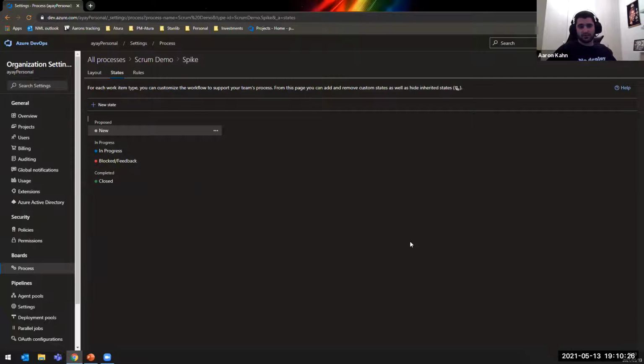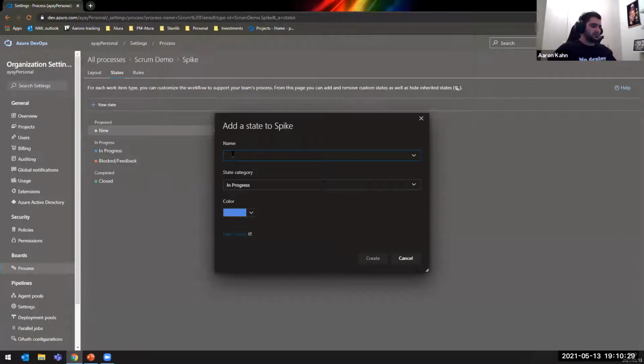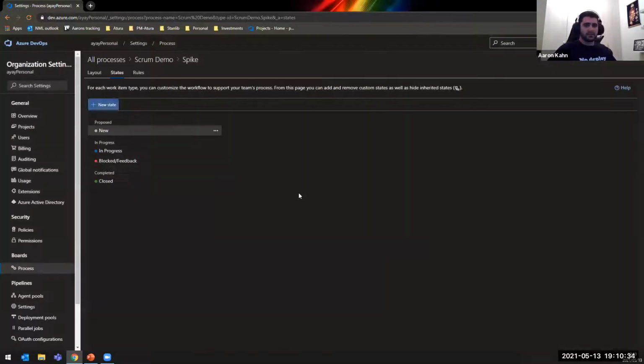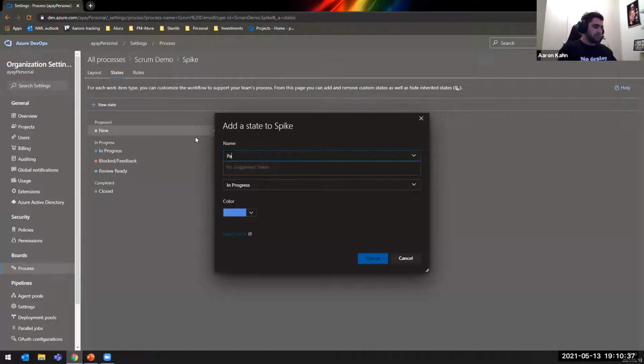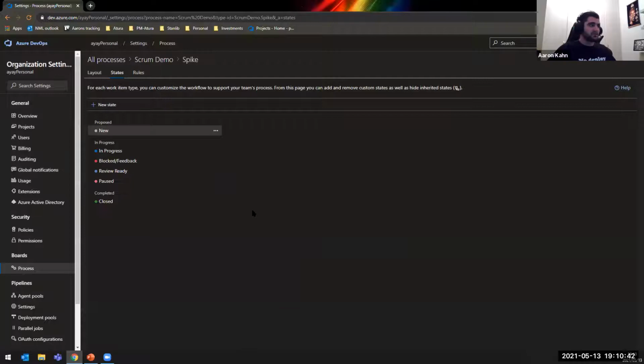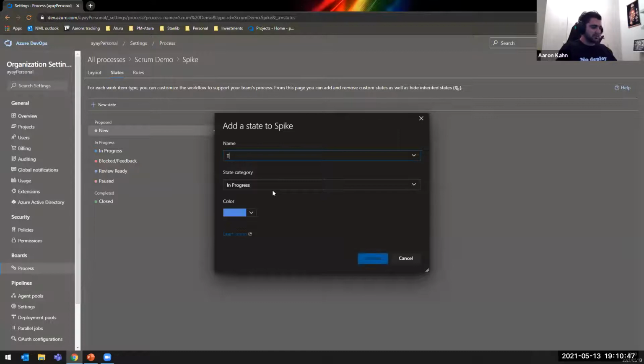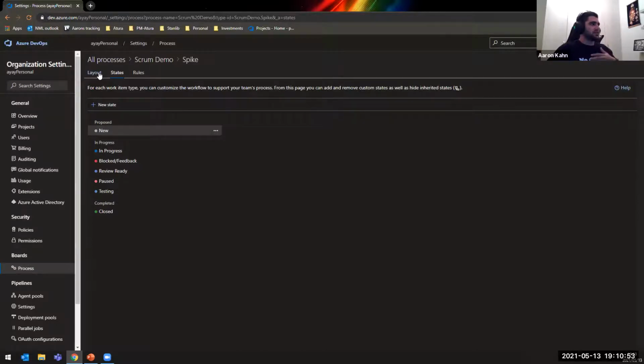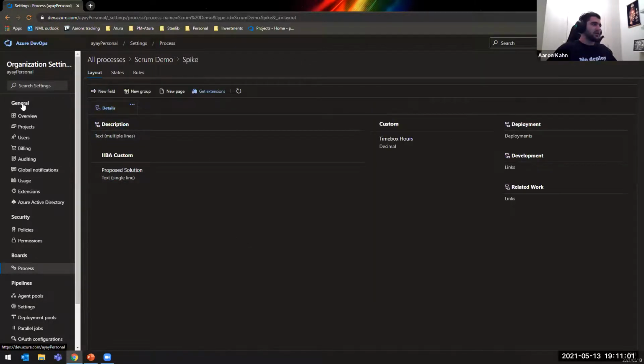Now, remember, we did create that. Well, sorry, we haven't done that yet. I'll get to that. We also want to add a new state, review ready, just so we know when it's actually gone into review. We want to add paused. Now, paused is not necessarily the same as blocked. It just means that it was in progress and for some reason has been paused. And then another one is testing or QA, whatever you want to call it, right? So now what we've actually done is created a whole new ticket type. We've got all our different states that we can actually look at and for better representation purposes. And once I create the project, I'll actually go ahead and create the spike and show you what this looks like.